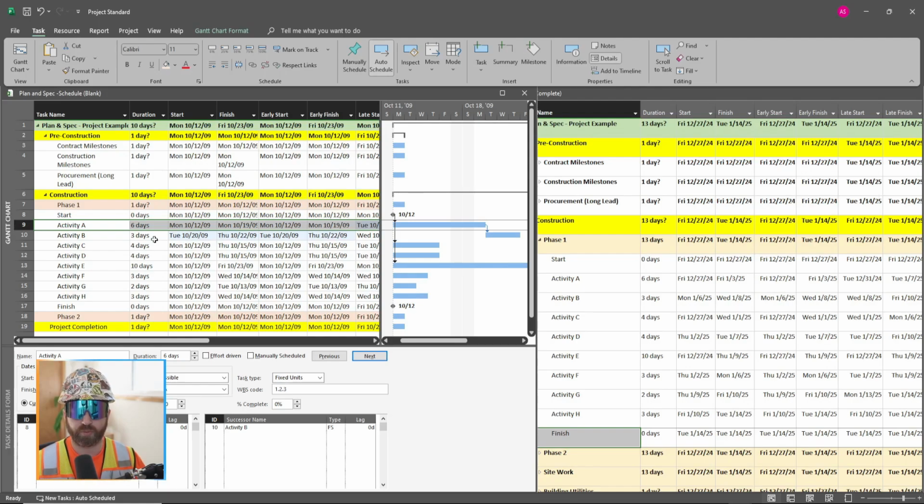So I'm going to go through the rest of this and compare what I have in here to our CPM diagram and input the rest of these values, going one at a time with activity B, C, D, E, F, G, and H, just adding all these successors.